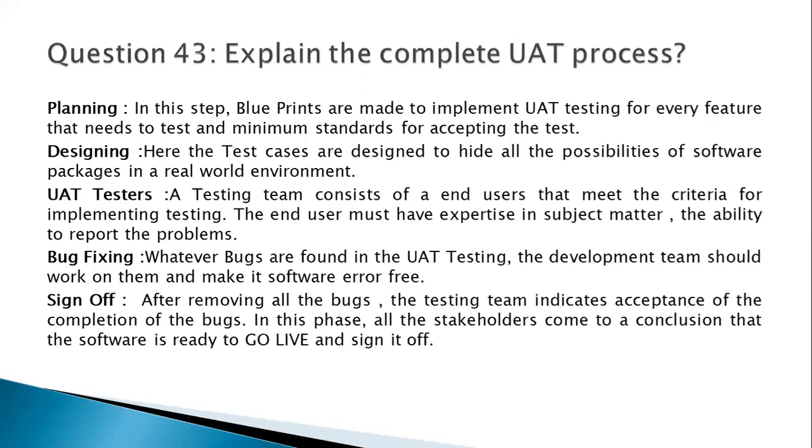Like for example, I want to have a test case scenario on search. I will take the test case and I will assign a UAT team. Okay, on this team, what is expected, what is the end result, and then I will see what is the gap, what is the bug that is there, and then I'll give it to the development team to work on it, and then we will sign off, guys. So basically in the UAT process, first we'll do the planning. Then I'll design the whole UAT test cases. Then we'll assign a team. We will run the test cases. Then we will fix the bugs and we will sign off on the UAT, and then it is ready. It is ready to go live.